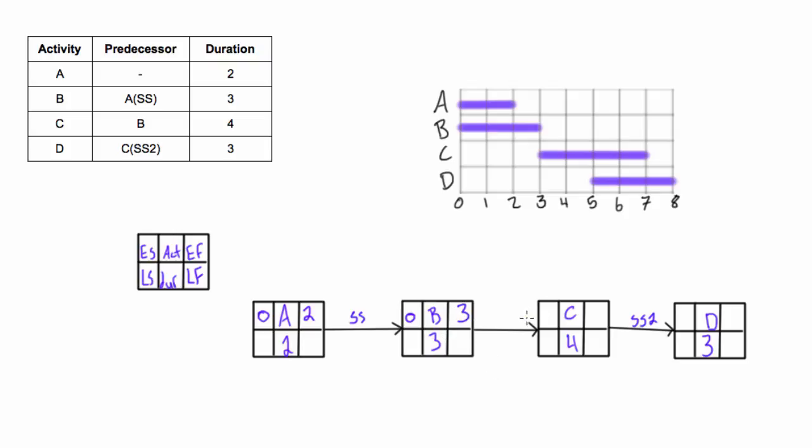Now this is a regular finish-start relationship, so we have to bring the 3 over and 3 plus 4 is 7. We're looking here, our start-start with a lag of 2, so the earliest start here can be two days after this starts, so we're going to be starting on 5. 3 plus 2 is 5 and then 5 plus 3 is 8.